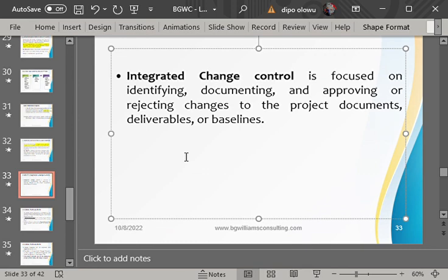Excuse me, sir, what do you mean by not having impact? If, for instance, there is going to be a change in scope, let's say somebody in your team, or maybe an outsider or a sponsor, just came and said, you know what, Kennedy, I want you to add these additional features to this project. You look at it, document it, note it, and check the implication and impact of that change. If it is going to affect other constraints.